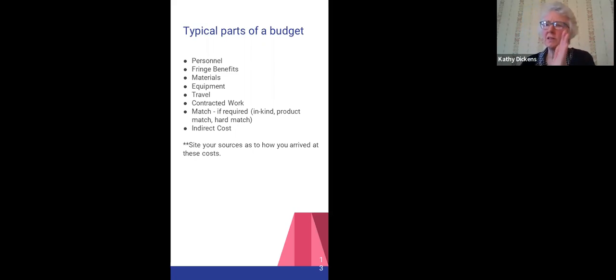But I looked at, okay, as a counselor, how many hours am I going to spend on this youth mental health first aid initiative over a year? And I'd say, well, it's going to be 15 hours a week. And at $55 an hour, that's an in-kind. And that was often how I did in-kind matching, or whomever I needed to leverage that was willing to just put skin in the game and hours toward a project without pay.